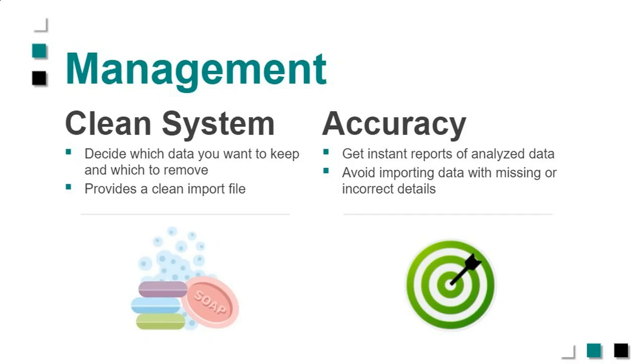So if you wanted to run a vendor report, but your vendor is called ABC or ABCD, and it's really the same vendor, it becomes very difficult to run any cross-project reporting, for example. So the idea is meant to make sure that the data you're bringing in stays clean. Things like calendars. You don't want your calendar to get overwritten with another calendar by mistake, which could change even your schedule dates. Okay, so it's really meant to make sure we keep our database tidy, clean, uncorrupted, as we call it, unpolluted as well.